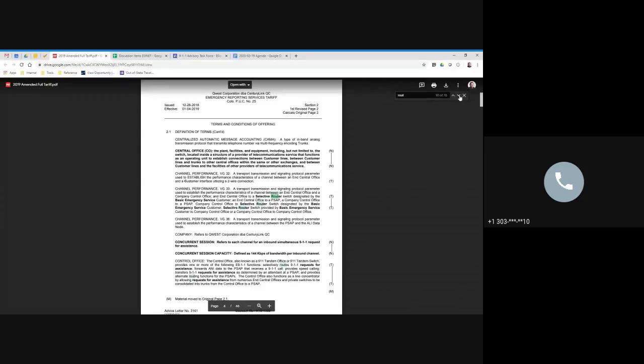And we can work with you if you want to have it placed somewhere else. But it would be time and materials for CenturyLink to do it, or you can have your PSAP technician put it someplace more convenient. But those were the main concerns, and I just wanted to be transparent with everybody going forward with that.